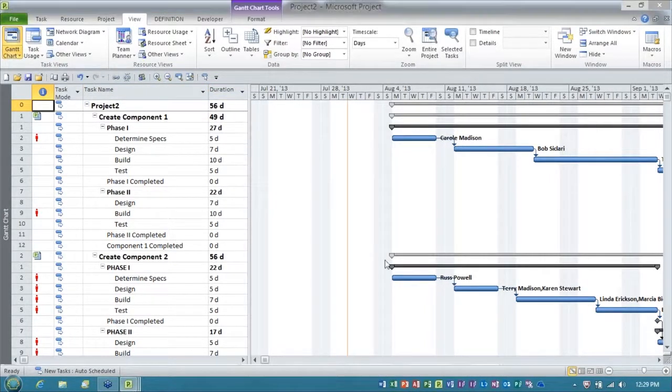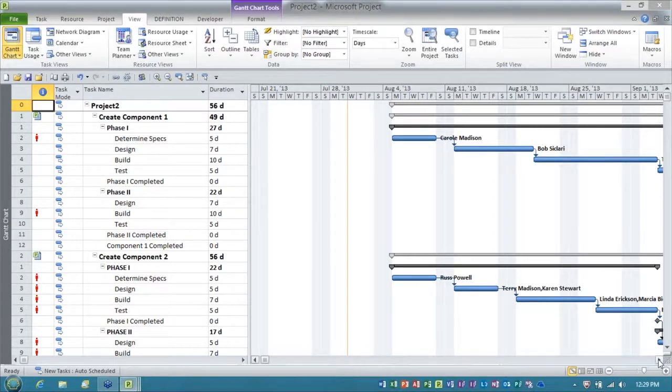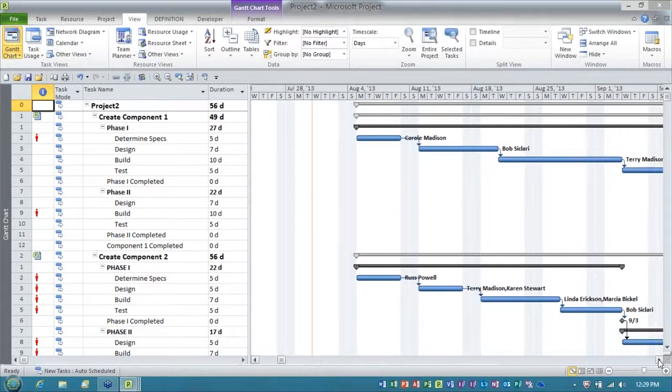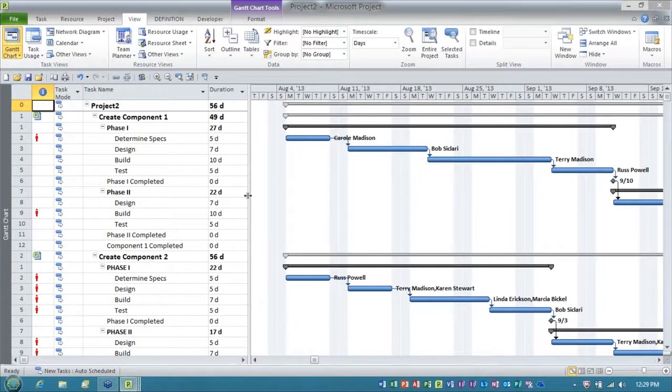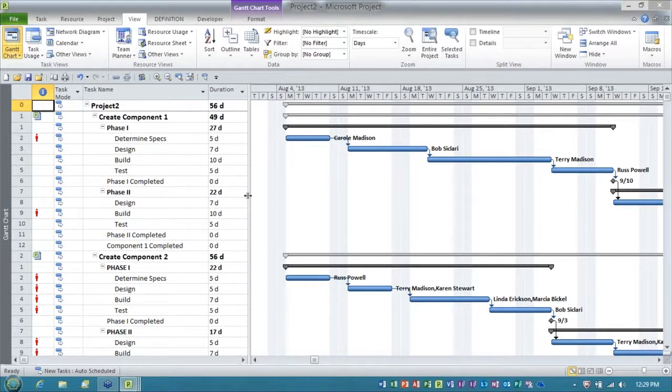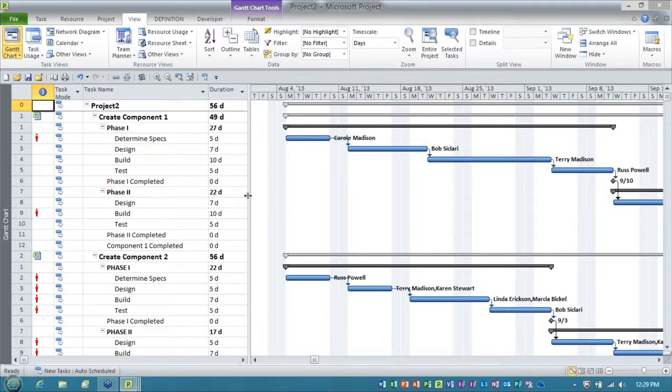Now the thing that's really nice about working with the temporary master is you can do anything you need to do. You can set cross project links, you can analyze resource allocation and resource over allocations, you can level across the project, all of those are capabilities.